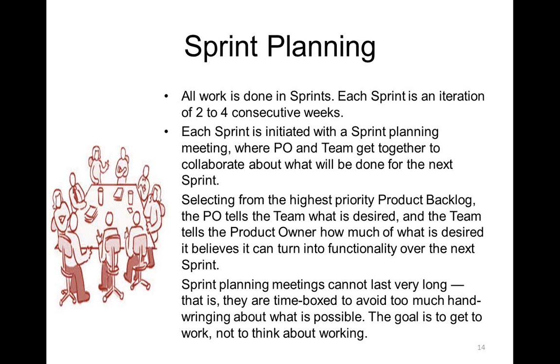It is also time boxed. In fact, every activity in Scrum is time boxed. So you decide, say for example, that this is the sprint length. Total sprint is maybe 2 weeks or 3 weeks or 4 weeks. In case it is a 2 week long sprint, you can't spend 2 or 3 days on just deciding what stories to commit for. So proportionate to that time, the team has to make a decision and estimate the time and effort required to do that.